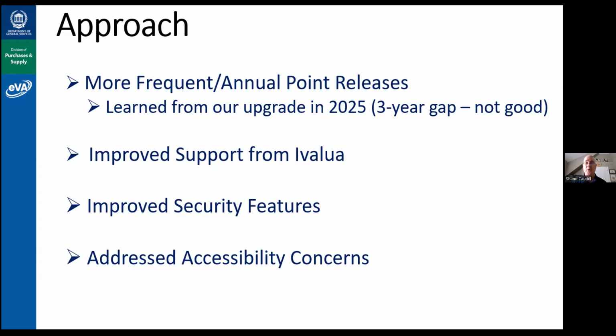And we avoided doing point release upgrades. It took us several years to even have the tolerance to get one scheduled. Well, we learned very quickly that didn't go very well. We ended up making the leap from 168 to 180. That was too many movements in point releases. It involved architectural changes and was such a big leap that the effort that went into it almost felt like a little mini transition project.